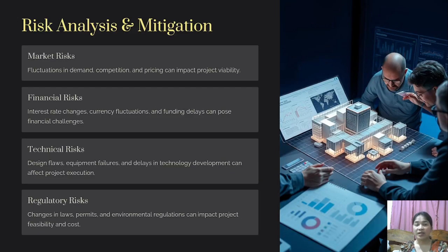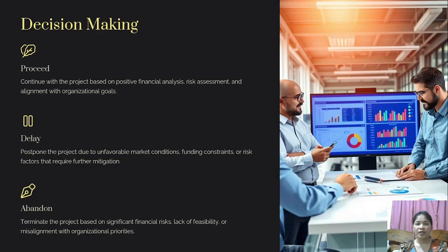And then, risk analysis and mitigation follows. In this portion, you are to identify and quantify risks associated with the project and prepare mitigation strategies. The key areas that you have to look into are the market risks, financial risks, technical risks, and regulatory risks. And after looking into those critical steps, decision making comes in. You are to base on financial analysis and risk assessment to decide whether to proceed, to delay, or to abandon